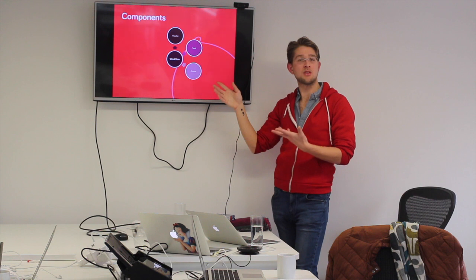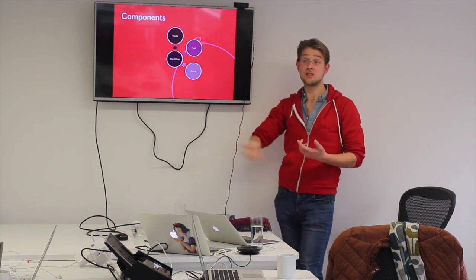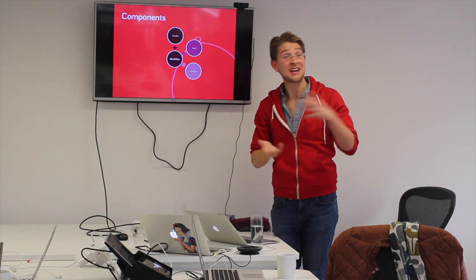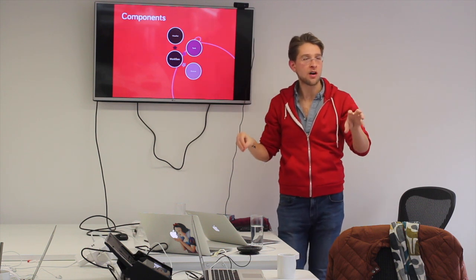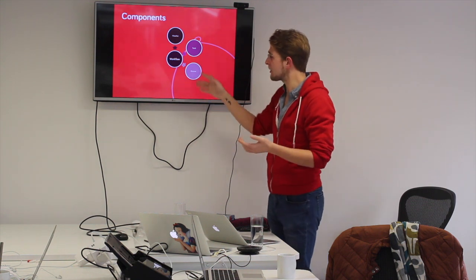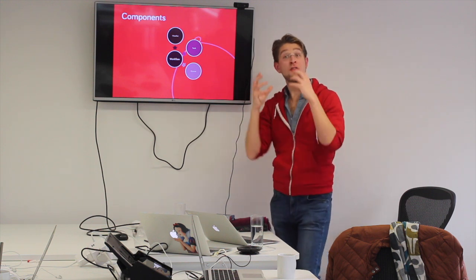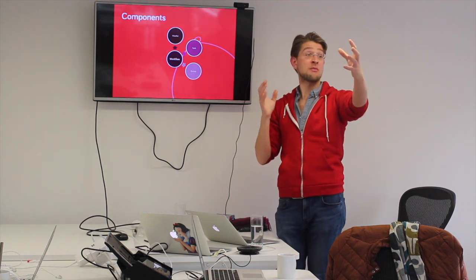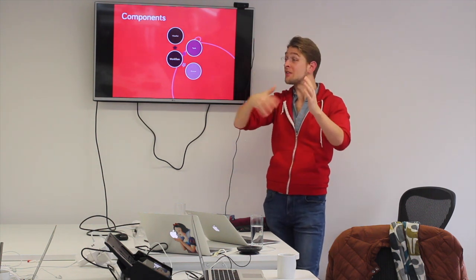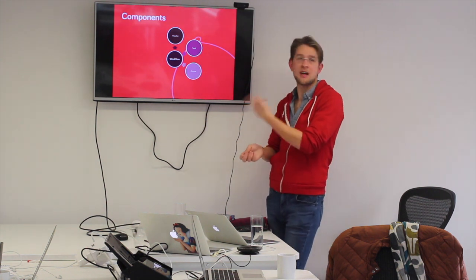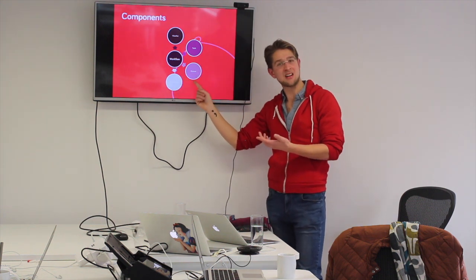Another is queues. There's some theory around workflow design about the efficient management of queues. So for instance, one of the specific bits of feedback that Steve has given us is that at the moment, for writers of tech narratives on tax credit claims, each writer has their own queue, and we manage who gets which pieces of work. There is a thing in the academic study around workflows that says that's not an efficient way to make a queue. If you have multiple people who are fulfilling the same role, and there is a volume of work that needs to be surfaced, it is more efficient to maintain a single queue for all of the people doing the same role, rather than maintain multiple queues. Various reasons for that, which we can explore later on. And there may be other queues in the business that we can handle more efficiently.